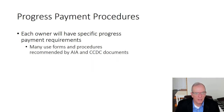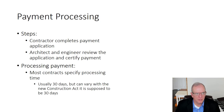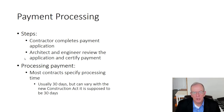You have to have some buffers built in so you're not operating right to the line, because things don't always work out as planned. And depending on contract requirements — you always have to look to the contract — whether it's AIA documents in the US or CCDC (Canadian Construction Documents Committee) documents in Canada, depending on the contract type, whether it's design-bid-build, construction management, or whatever it may be. The contractor completes the payment application, and a consultant working in the owner's interest will certify it.